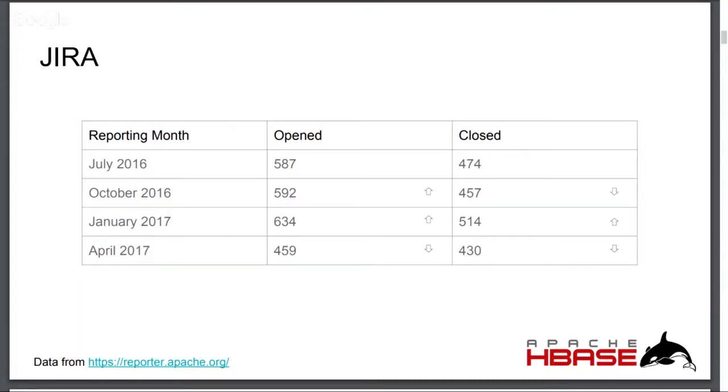As you may know, we have a huge major release 2.0 waiting in the wings. And we had, towards the end of last year, early beginning of this year, a lot of work coming in to the finish line for 2.0. Since then, our velocity is down a little bit, but these are the stabilization issues, the debugging issues, the things that take longer to fix. So these earlier issues were like, here's a feature thing, get it in. Here's the other phase of the feature thing, get it in. Well, we're past all of that. So although we're taking on fewer tickets, they have more meat and are the interesting stabilization work that happens just ahead of a new major release. So also I would say still indication of good project health.